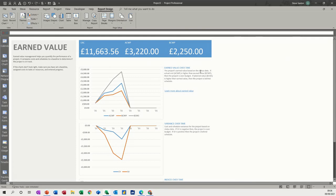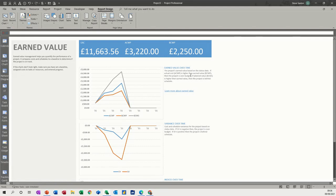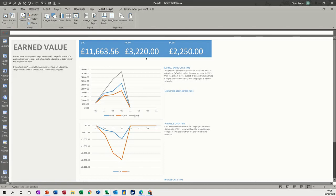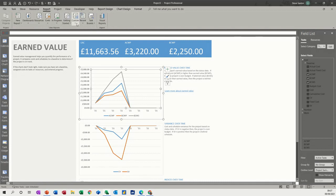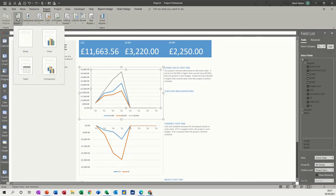It tells you there a project value based on the status date. That gives you another indication that you need to be thinking about the status date. If the actual cost ACWP, which is this blue line, is higher than the BCWP, which is the orange line, you're over budget. These are the fields that you need in your report - the budget cost work perform, actual cost is there, that's what you're expected at the end of the project.